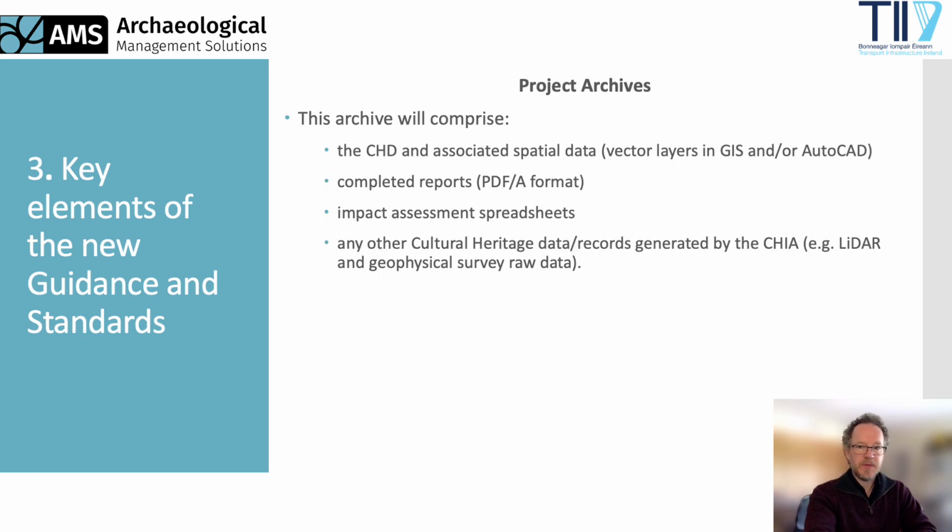Throughout the PMG phases, cultural heritage professionals will also need to submit a project archive for each iteration of assessment. This archive will comprise the CHD and associated spatial data in GIS or CAD, completed reports in PDFA format, impact assessment spreadsheets, and any other cultural heritage data or records generated by the assessment, including, for example, LiDAR and geophysical survey raw data.